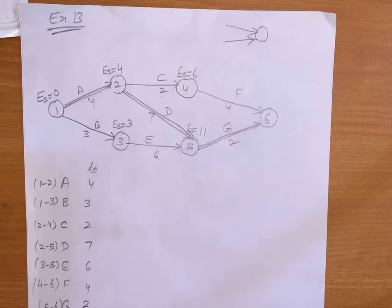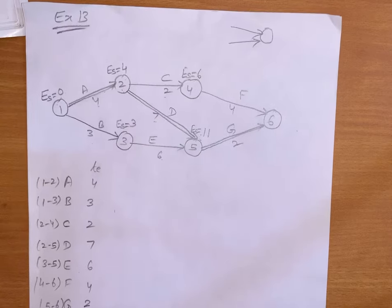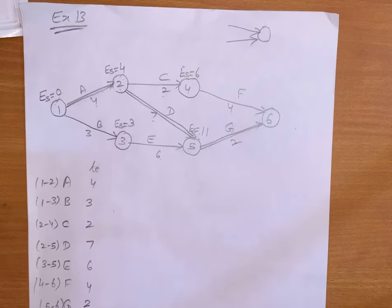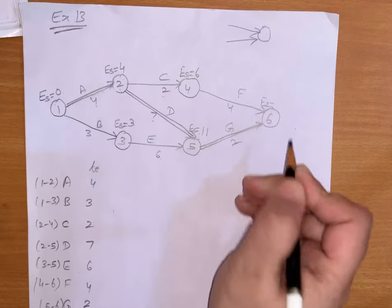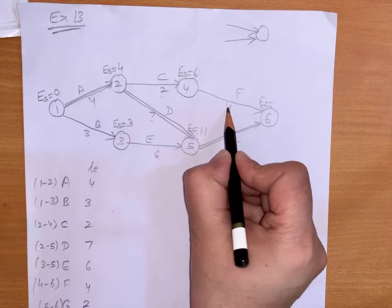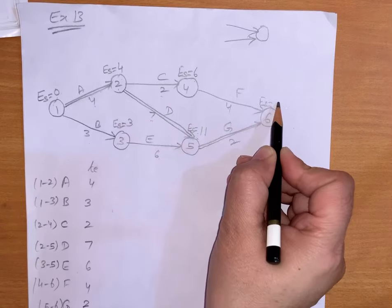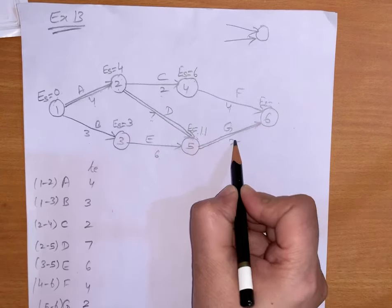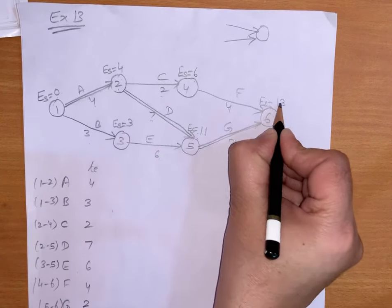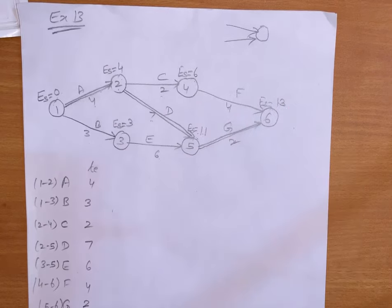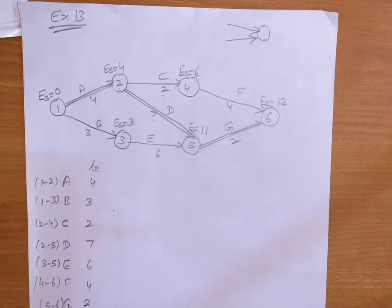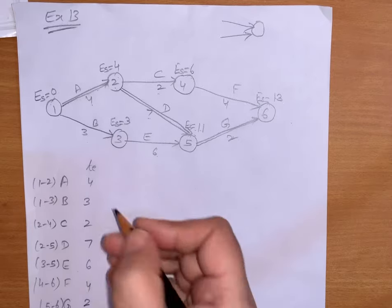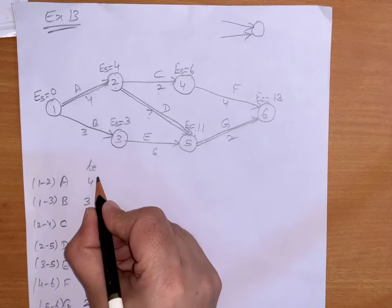So whenever there is an event where two activities are merging, we will take the longest path. Now for event 6, again the same — we have two options: 6 plus 4 equals 10, and 11 plus 2 equals 13. We will go for the longest one, which is 13. So we have calculated earliest start for every event.